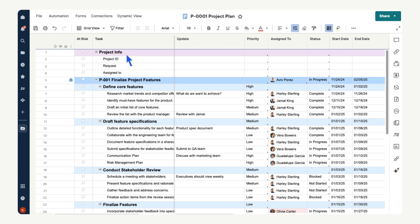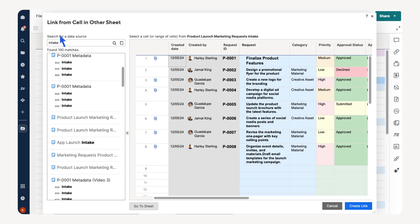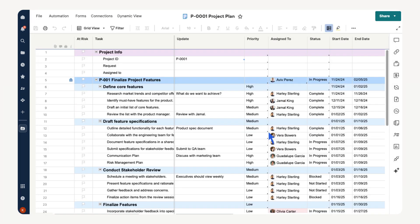To create a cell link, right-click in the cell, then select link from cell in other sheet. Find your source sheet, in this case our project intake sheet. Then select the field we want to cell link. Select create link. Now the project ID appears, and the blue arrow in the cell indicates the data is input through a cell link.